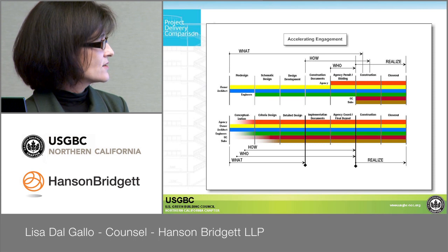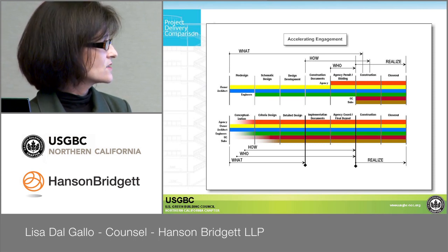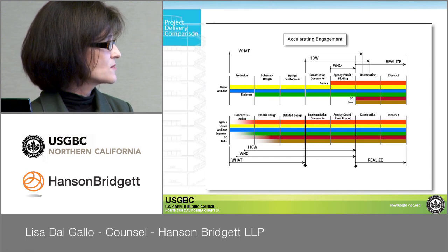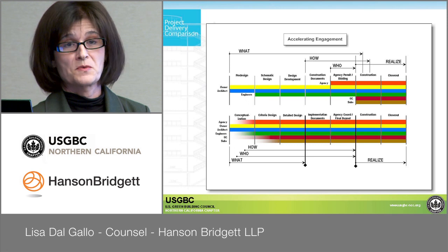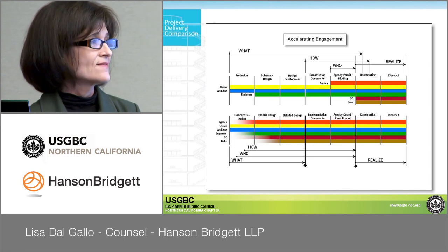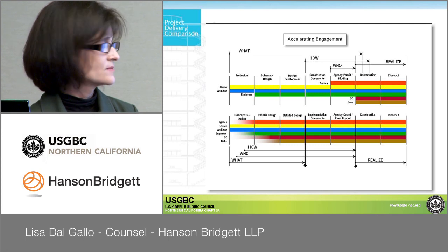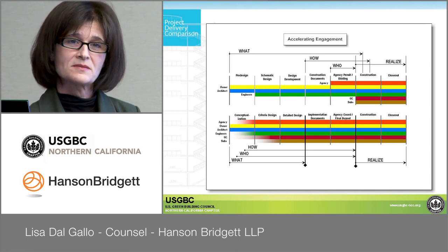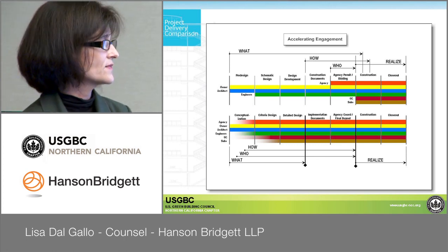Under the IPD scenario, you can see everybody's on board pretty darn early here. The target cost is going to be set right in here somewhere between conceptualization and design criteria. That's when they're going to determine what the project schedule is. And so they're going to know pretty much what they're building earlier after detailed design, because they're using BIM and all kinds of technology. They pretty much know how this project's going to go. They know what they're building.